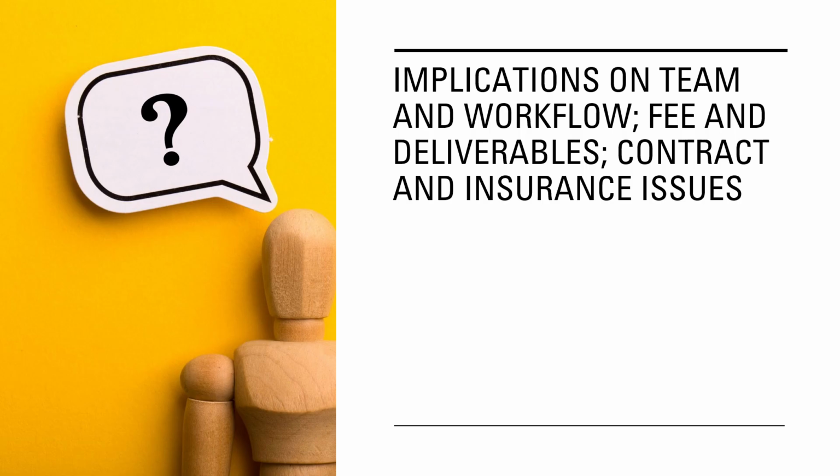Contracts and legal frameworks. BIM introduces new liabilities, data ownership questions, and the need for protocols like the BIM execution plan and employers' information requirements. Insurance and risk management. With more data and shared models, the potential for errors shifts, requiring updated coverage and mitigation strategies.